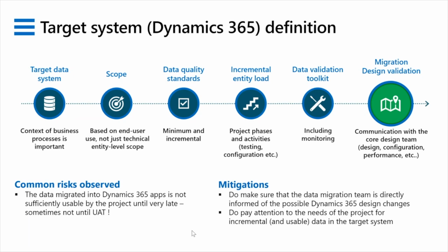Similarly, if you've got 20, but they are only in customer group A, and you're not yet ready to migrate maybe those in customer group B or C because they're more complex customer hierarchies or some other complication, even that is preferable because you've got something meaningful, well-defined, that's usable. It's okay then in the next iteration to bring in the more complex data.